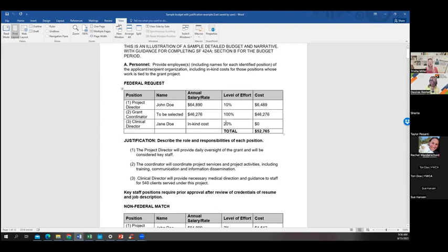Remember when we talked about the difference between your total program budget and the grant budget? This person is going to work there, but they're not getting paid from this particular grant. So that Jane Doe would go into your overall total, the 5 components we talked about on Tuesday, but it's not going into this grant. We're considering that in-kind because it's not coming from here. Either they're volunteering or they're being paid from something else. It looks as though it's volunteering into this particular grant.